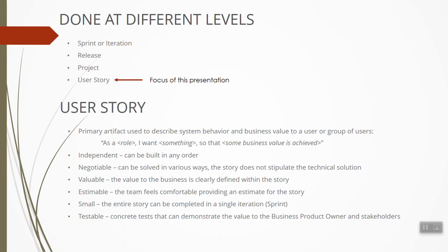Similarly for release, you have different requirements. You may look into the security levels. You may look into the timings when the release has to happen. Prior to release, you might need to complete some documentation that has been planned and listed. You do those checklists. So the release might have a different definition of done.